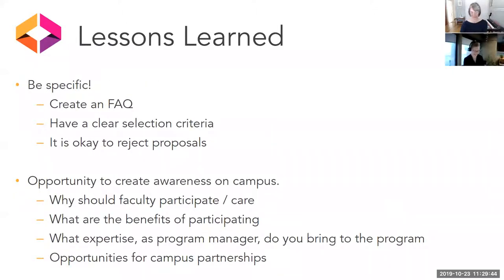Lessons learned — there's a lot. I'm still learning after the number of call proposals and textbooks we've done. Be specific. Write both the internal and external call for proposal. Document as much as possible and create an FAQ. This will not only help you field questions — it will also document the decisions that were made. For your budgetary information, put it in your FAQ: what will be paid, what will not be paid, contracts, production services, minimum requirements.